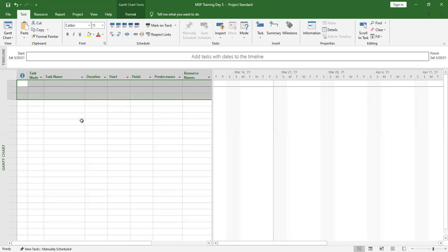So that's when multiple projects come in. We're going to demonstrate it by creating 2 different projects. Then we create another one, which is going to act as a master project to the other 2. So we link the other 2 into this blank one. I'm going to create 2 projects, then a third one, which is blank, and that third project is going to act as a master project to the other 2.